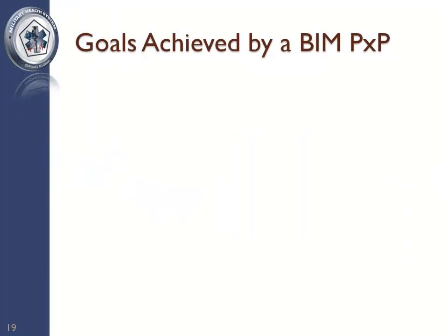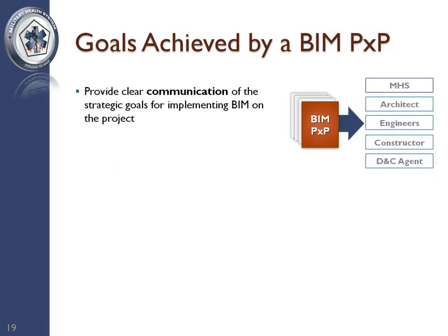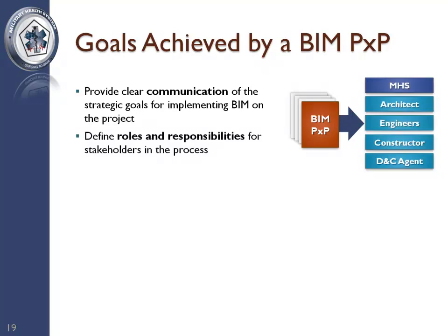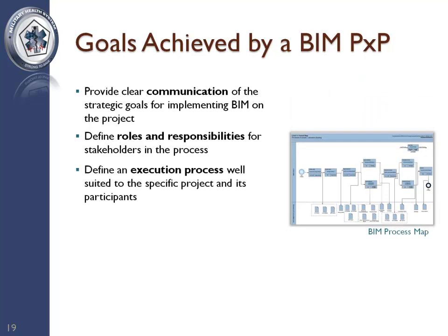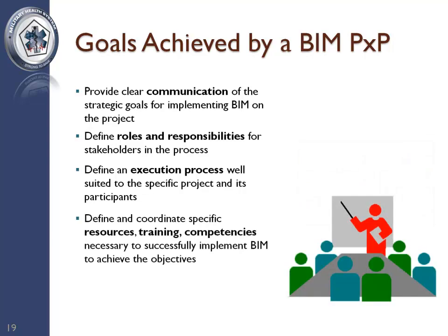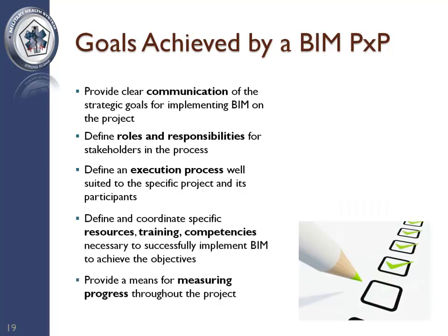BIM is an evolving technology, and the methods for its deployment and implementation vary between firms. The BIM PxP allows the entire team to understand the strategic BIM goals for the project, their roles and responsibilities, and to plan their work process. This reduces the overall risk to the project because execution processes and deadlines are defined at the beginning of the project, as are the resources necessary for the effort. It is a way to measure progress throughout the project.